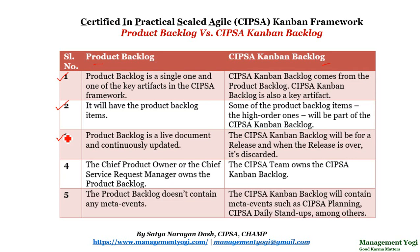Difference number three: the product backlog is a live document and continuously updated — it is not a static document. If new requirements come up, those will be added to the product backlog and prioritization will happen. The SIPSA Kanban backlog, on the other hand, is for a release, and when the release is over this backlog will be discarded.